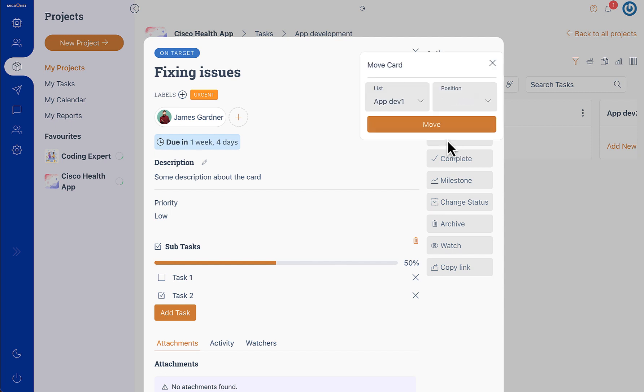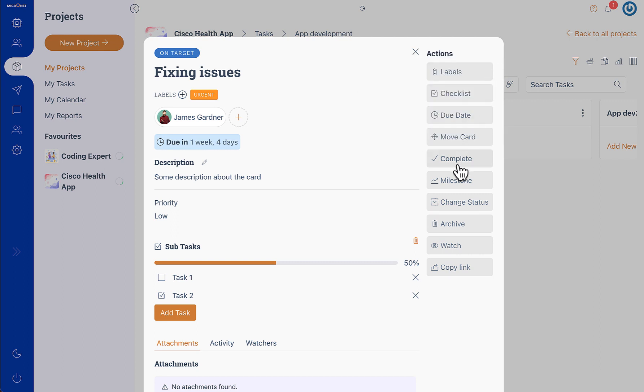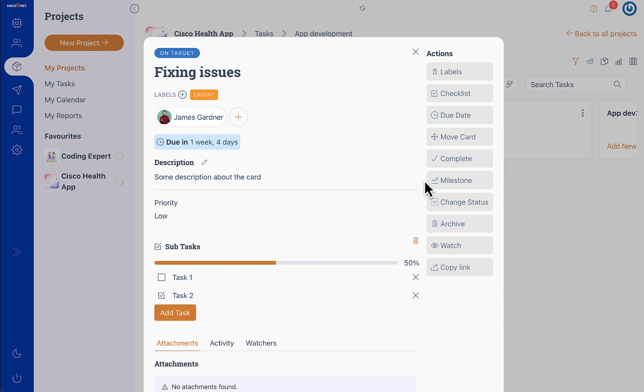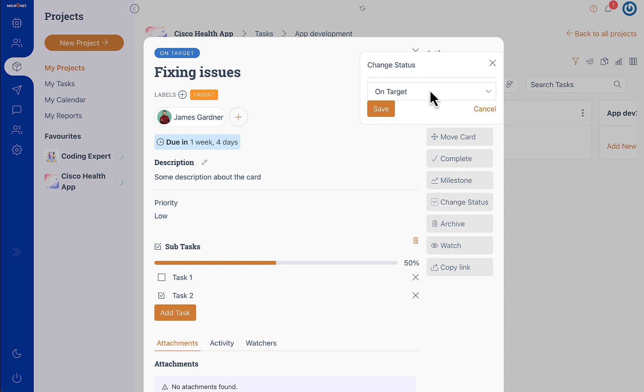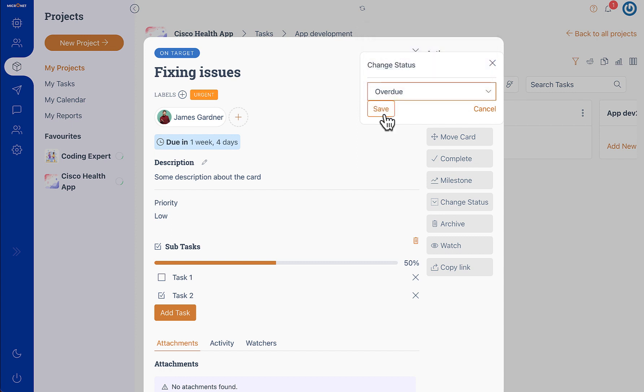Then you can move this card to a different list, which is also the stage of the card, to a different position, or mark the card as complete, or mark the card as a milestone. Milestones are important tasks which are of significance to the project. We have a different section for managing these milestones which we call Gantt chart, and we will cover it later in our tutorial. Then we have the task status and here you can update the status of the task.